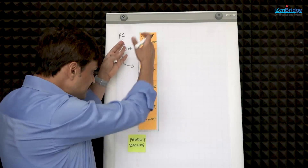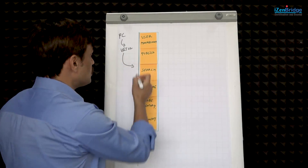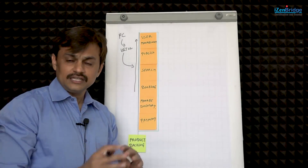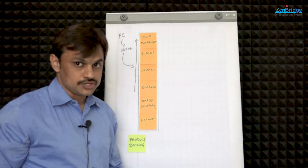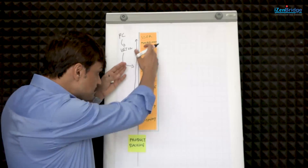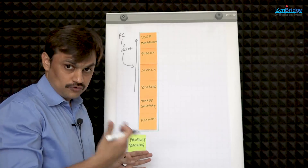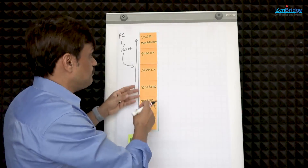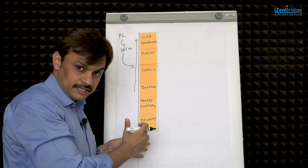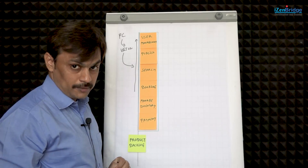They are not yet refined, but you are putting them into a list and may also work with stakeholders to come up with the priority. So within the first week of your project initiation you may have a product backlog to start with. Now this product backlog is never going to be baselined. In agile ways of working, over time we will look at each requirement, add more requirements, elaborate them, and keep refining this product backlog.